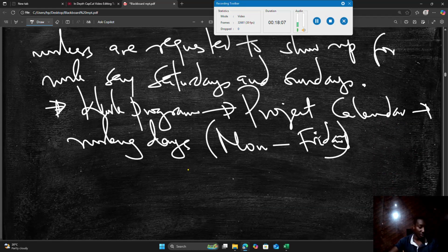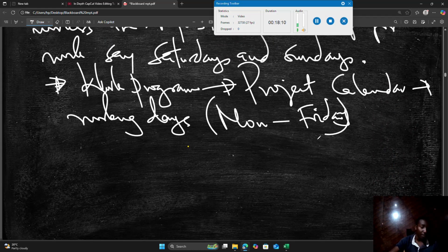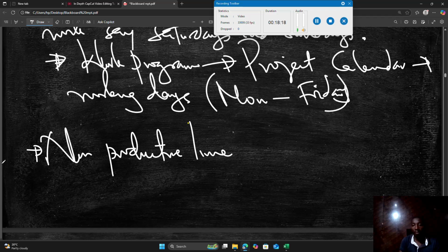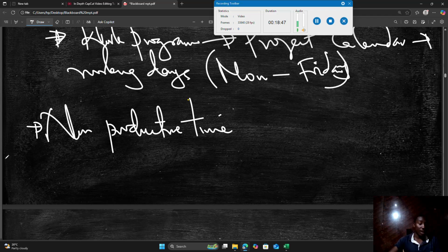Then, we have other statutory requirements like non-productive time, the guaranteed week. Sometimes workers will show up and it's a problem of the contractor that materials are not on site, or of weather, or they have to take breaks, lunch breaks. All that, they deserve their wage. So we have the non-productive time guaranteed week payments and things like that.